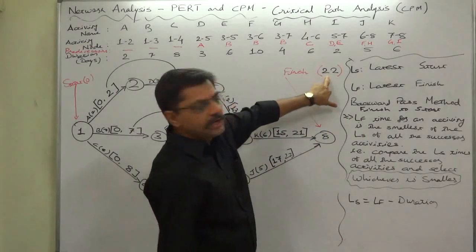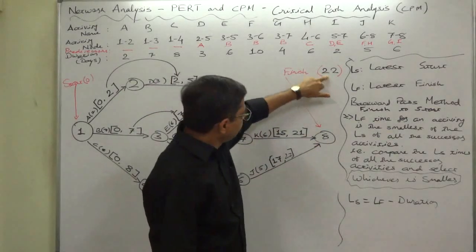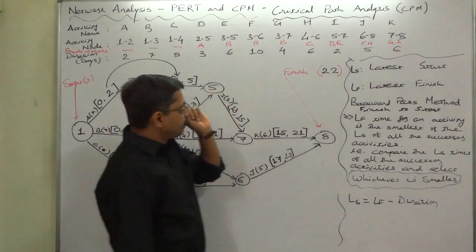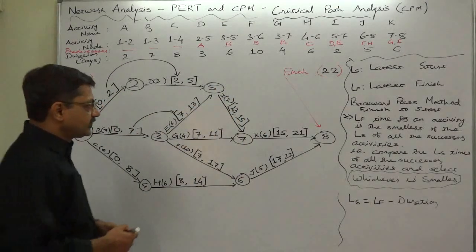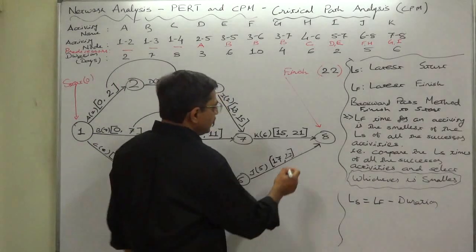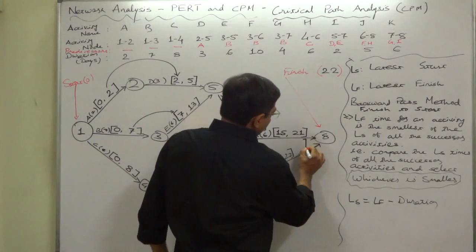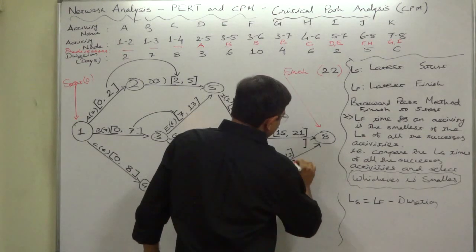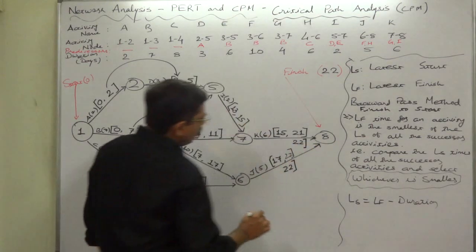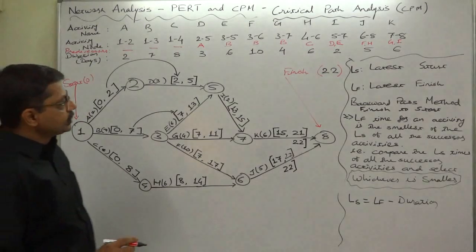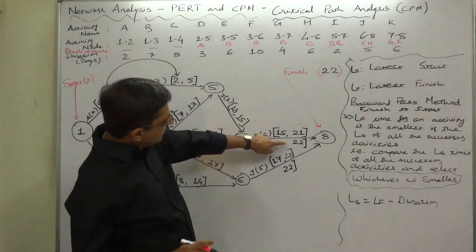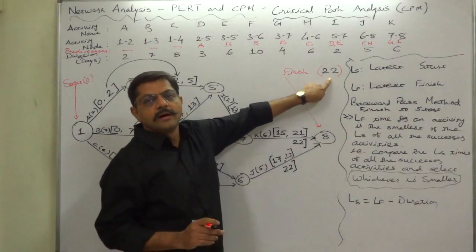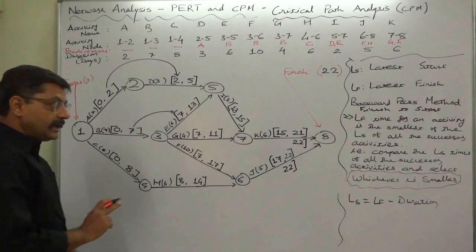On the basis of the previous lecture, we know that the earliest finish time of the project is 22. That itself will be taken as the latest finish time of the project. There are two end activities, and for both the end activities we should take the latest finish time, which is the earliest finish time itself - 22.